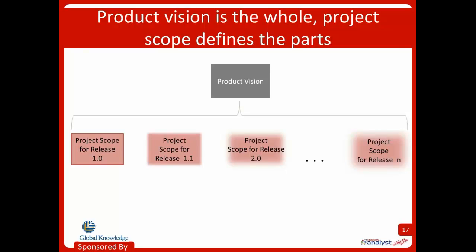Now, the vision statement applies to the product as a whole, and the overall vision, in truth, should change relatively slowly as a product's strategic positioning or the company's business objectives evolve over time, right? So vision is something that you can think about kind of long term and paint that picture. Now, when we talk about the concept of scope, which I'm about to switch to in a little bit more detail, the concept of scope really pertains to a specific project or maybe even an iteration within a project that we're going to implement and then maybe the next increment of the product's functionality, okay?